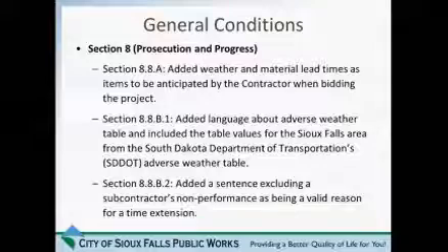That section's meant to provide some leniency if a private utility company, say, has to relocate a line in advance of our street project. The subcontractor shouldn't be an excuse for a time extension, since the general should have control over his subcontractors.